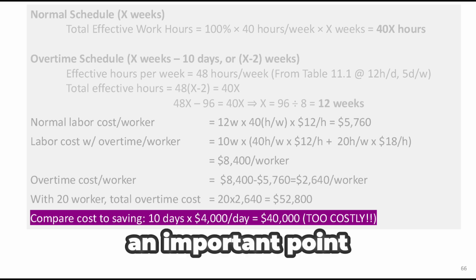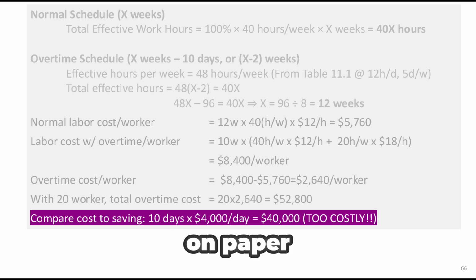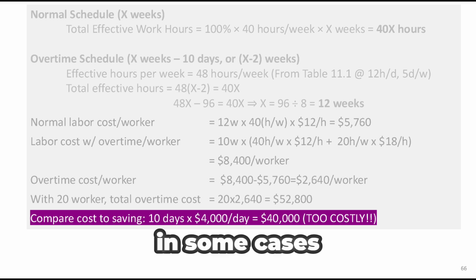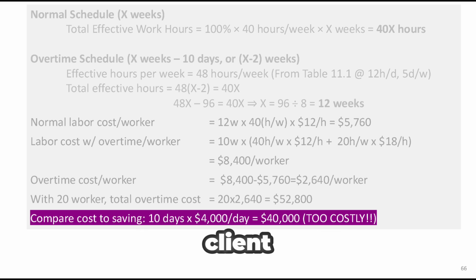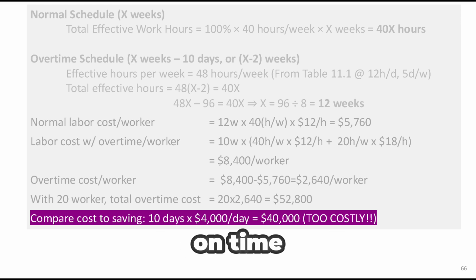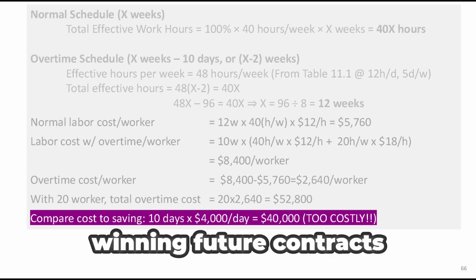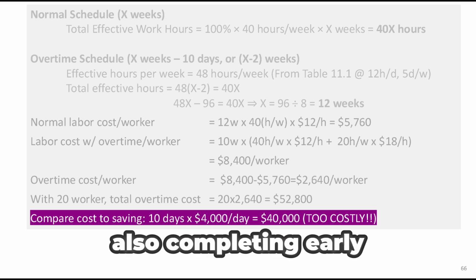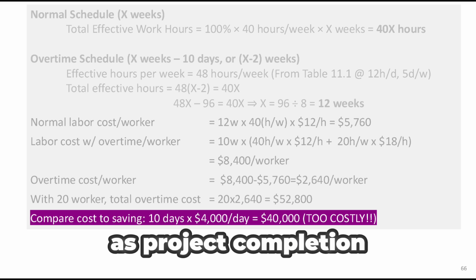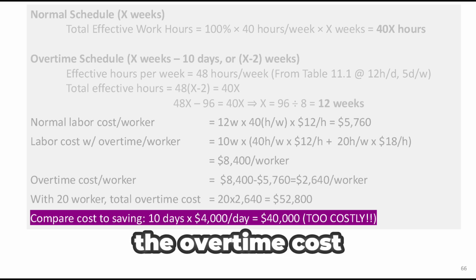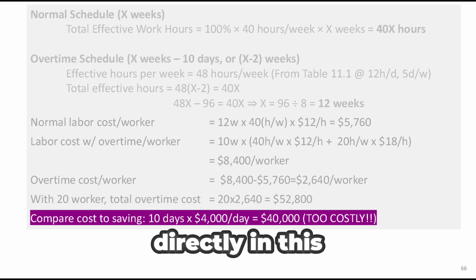But here's an important point. Even though it's not cost-effective on paper, some contractors still choose to go ahead with the overtime schedule. In some cases, maintaining a good relationship with the client or preserving the company's track record for on-time delivery is more important than the money lost in overtime. Completing a project on time can be a key condition for winning future contracts, especially from high-value clients. Also, completing early would benefit the cash flow as project completion unlocks final payments and retention releases, which can offset the overtime cost in ways not reflected directly in this calculation.